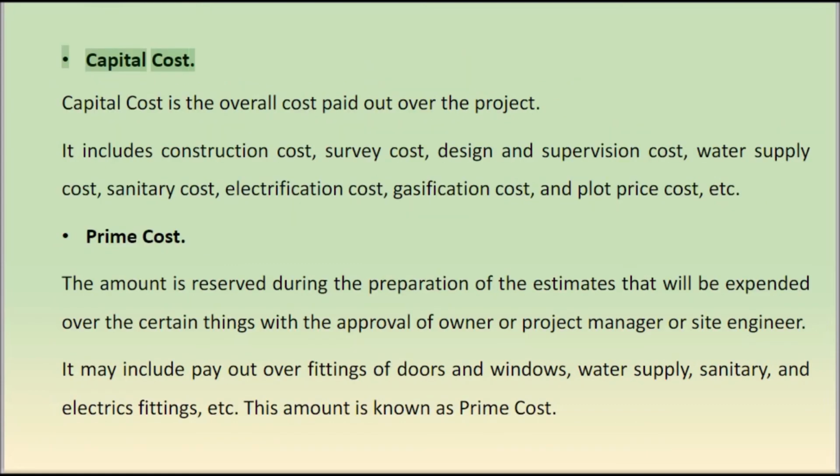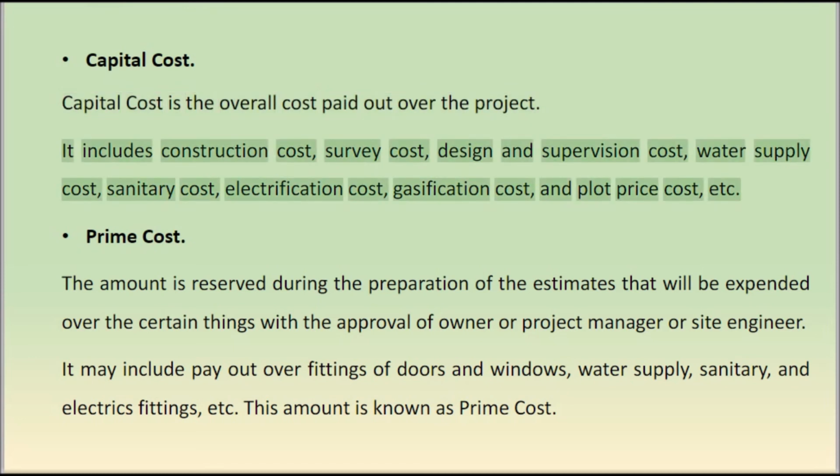Capital cost. Capital cost is the overall cost paid out over the project. It includes construction cost, survey cost, design and supervision cost, water supply cost, sanitary cost, electrification cost, gasification cost, and plot price cost, etc.